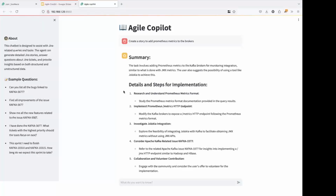So the first thing, it finds related tasks that have been solved in the past that are similar to the tasks that you are asking to create right now, essentially, right? This allows you to do a couple of different things. It allows you to point out that there are already existing tasks in the roadmap, so you don't have to create a new one. Or I want to be able to say who is the person that worked in these areas in the past and who is best to work on this area now. Or look at how long those tasks have taken in the past and try to figure out how long the new tasks are going to take. So that's the first step.